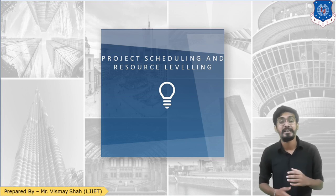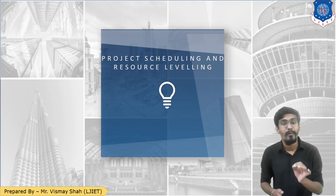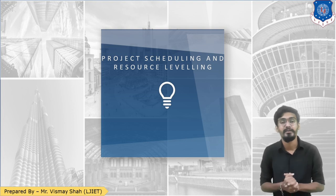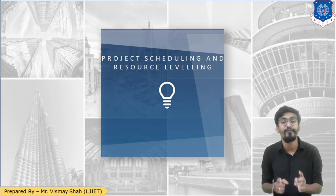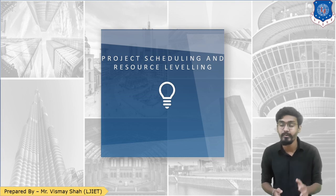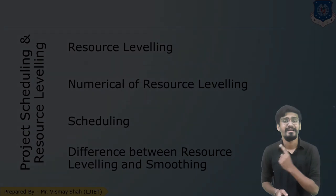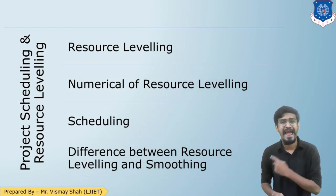Resource smoothing is done when there is a restriction on the project duration. When you have said that the project is to be completed in 30 days, then and only then you need to apply resource smoothing by fluctuating the float available with the non-critical activities. Today in this session we are going to learn resource leveling and scheduling.